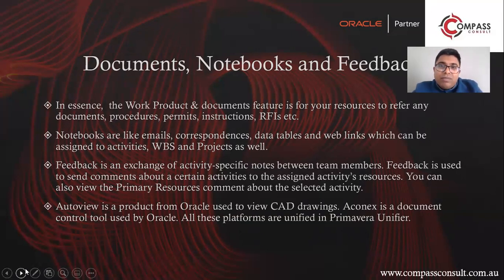So all the permits for a basic activity, let's say you're doing excavation. All your documents pertaining to excavation will be attached to the excavation activity, so that the operations team, the owner, everybody knows what is happening on this activity and what documents are associated with it.